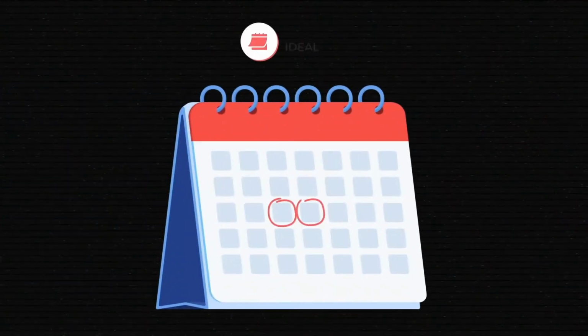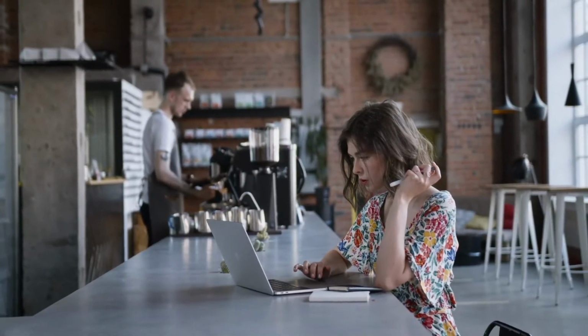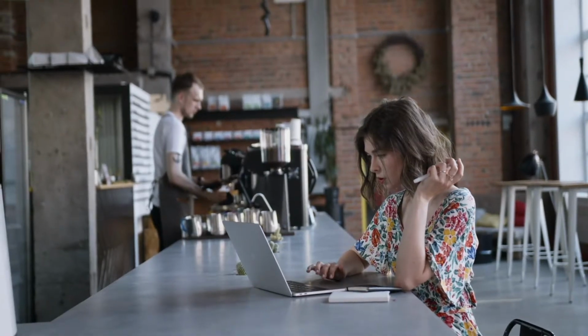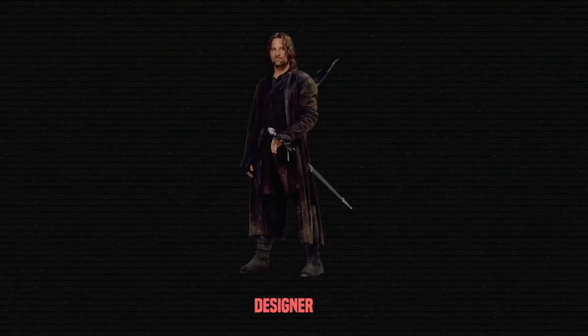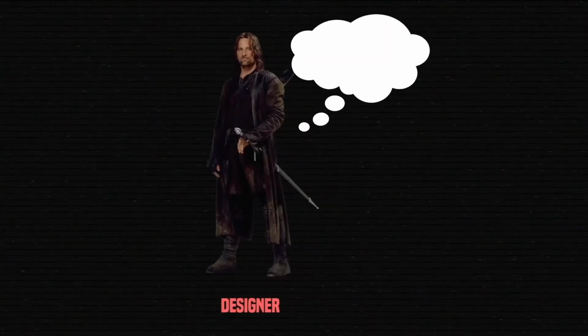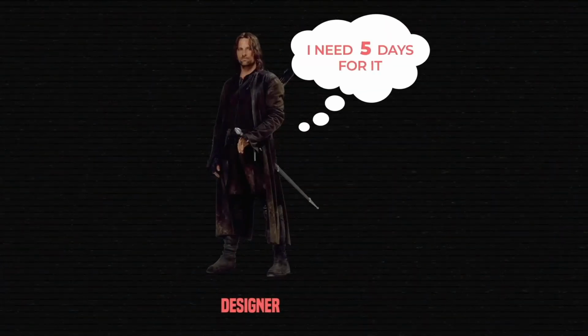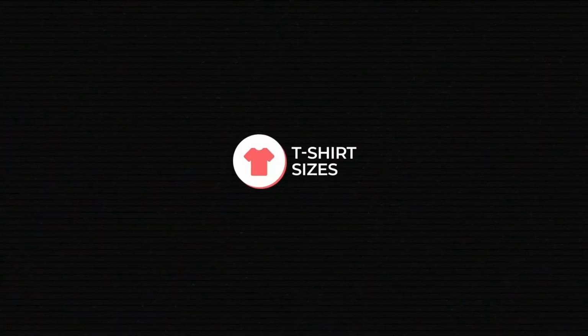Take ideal days. This is something familiar to any person who has to plan anything, really. If you were to work without interruption, how many days would it take you to finish it? For example, a designer, knowing their past experience of doing similar tasks, might estimate that it will take 5 days to design the homepage. But to be on the safer side, they might double that to account for all possible interruptions. Or to simplify the matters, you can use t-shirt sizes.